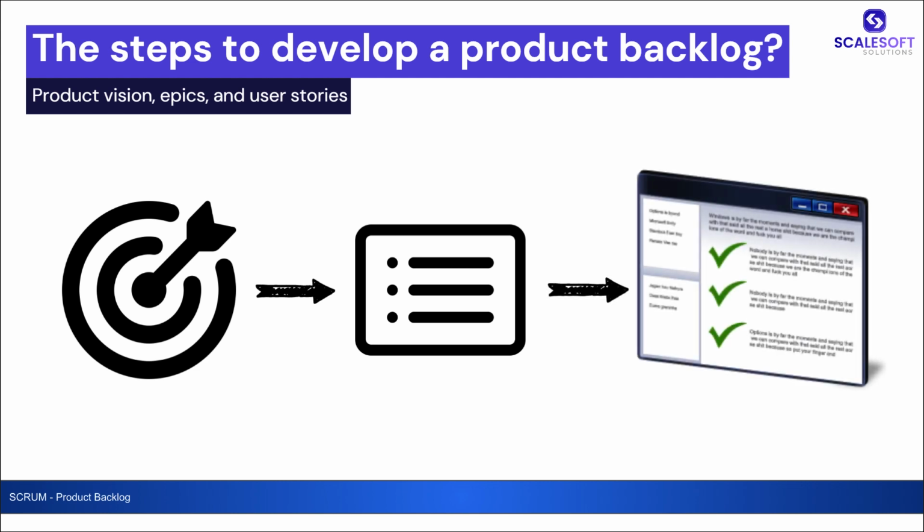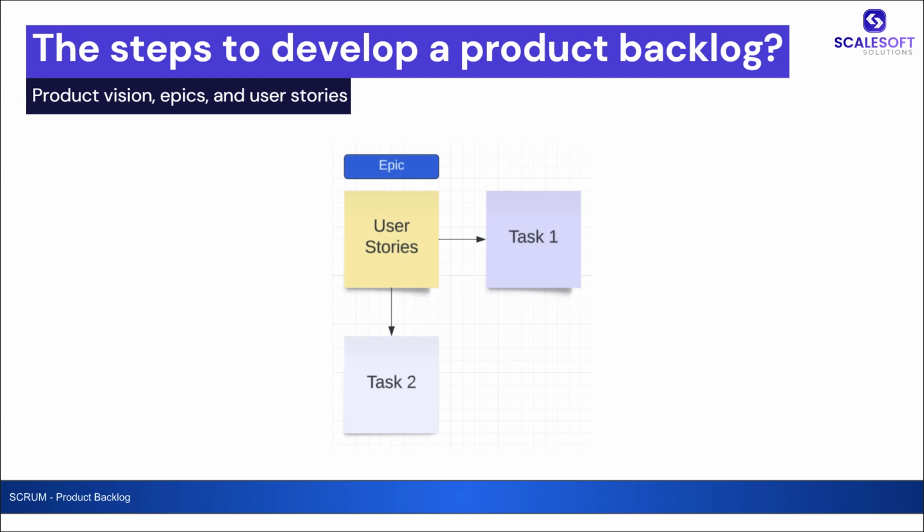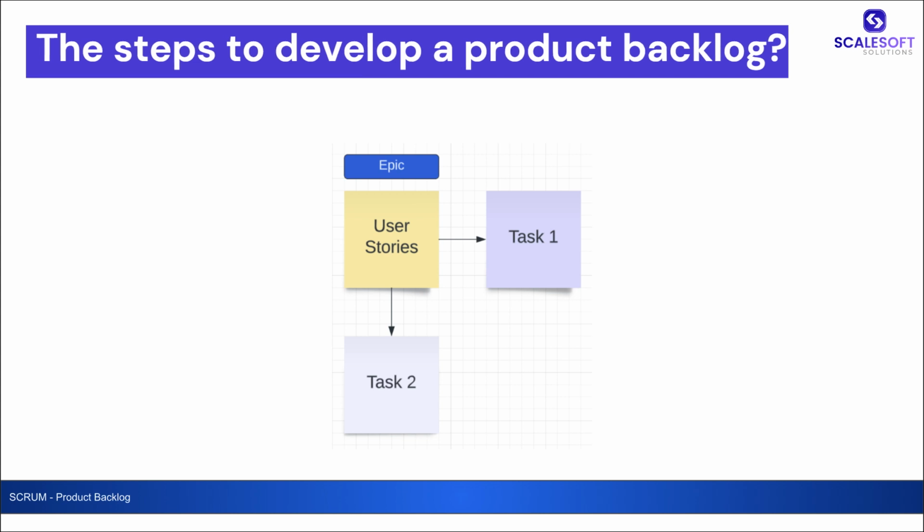So how can we do that, or how can we generate those items? The answer is, again, by dividing your epics into even smaller items called requirements. As you noticed here, it is really by cutting down what we have into smaller chunks, and then we move on to the next step. To give you more clarification, application requirements or product backlog items are usually added as user stories. However, there are other types that we will look into later on. They are related, such as I said, as bugs or maybe change requests or other requirements.